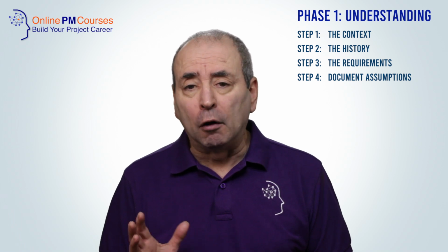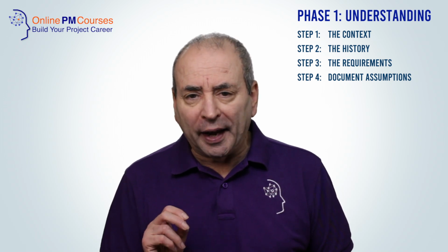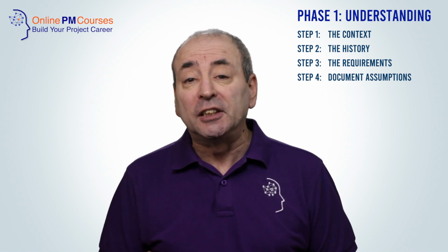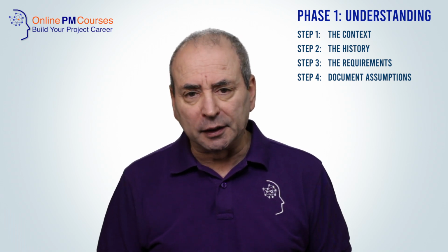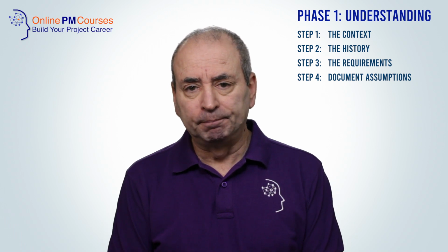All estimates are rooted in a set of assumptions. We need to make assumptions, but if we forget that that is all they are and we fail to document them, then we may not test those assumptions. If they turn out to be correct, then we can have more confidence about our estimates. If they turn out to be wrong, we can change those estimates.